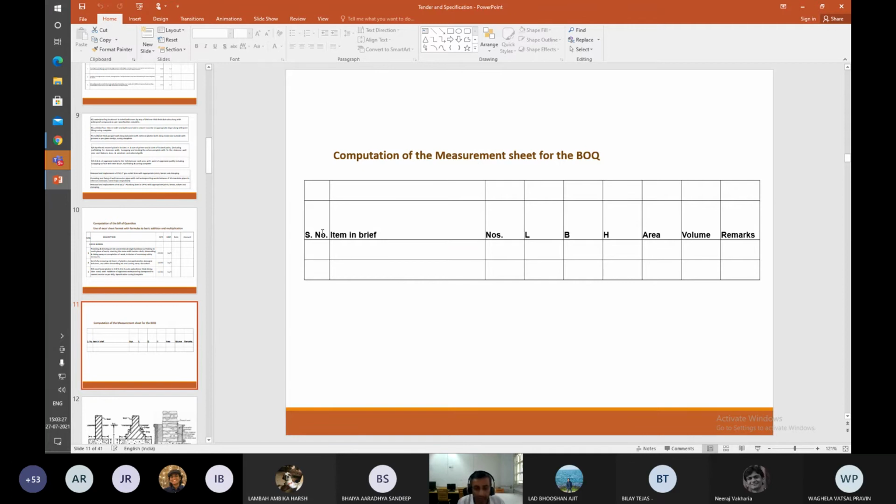So especially when you have thin, narrow, long trenches like those in gutters, okay, you need to do shoring, otherwise they tend to collapse, and when they collapse, they cause more damage than good. So shoring is the word.